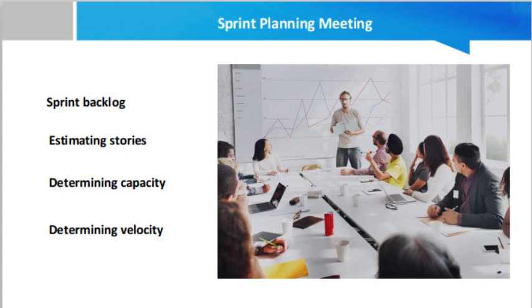Normally before starting this sprint planning meeting, the Scrum master and Scrum product owner should review the team's capacity and look at the overall timeline of the project.